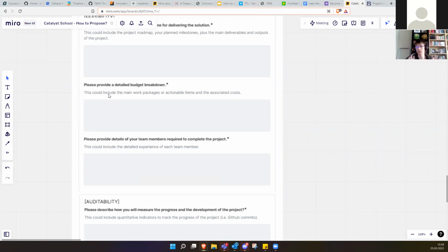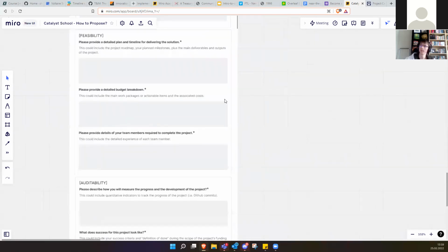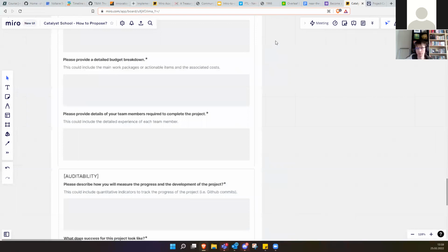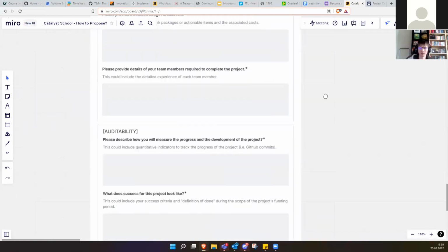So all of these things you feel you need to do in order to put this project together, at least what I do is I do them in detail, I make them components, I estimate some time, and then you put your price on top of that, let's say $40 per hour, and then you can calculate your total budget, and then you have a budget breakdown. And then people can argue whether it's too costly or not, or whether something is missing or not.